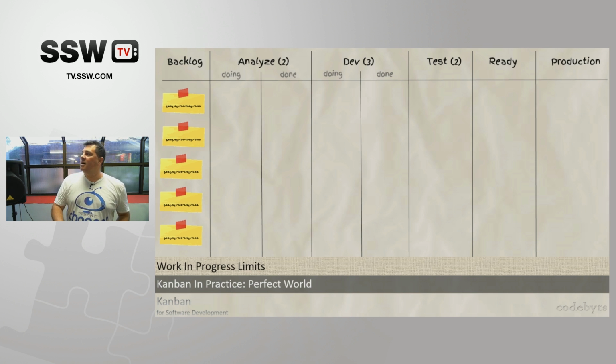So with these WIP limits, we're just going to limit people. How do we come up with these WIP limits? At the beginning, I would advise to keep them small. So let's say 1 per person that you have on that team. And the reason I say this is, even though they may do more, it will immediately show you if you have any bottlenecks or any slack. If you have 2 analyzers, and let's say they're super good and can do 2 things each, you will immediately see that, because they will go through items and keep pushing to their done column where the developers cannot pull them. And you say, hey, we have a problem here. We will see in a few minutes how we can see where slack is, where what we call column starvation happens, which is when the column is empty and cannot get anything.